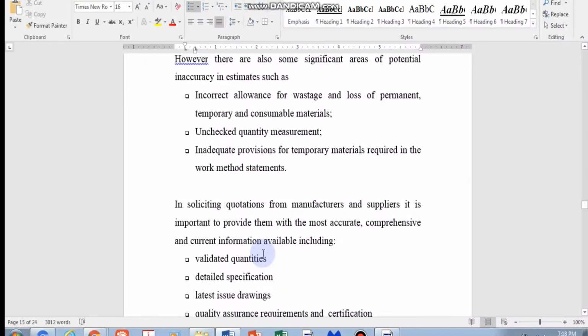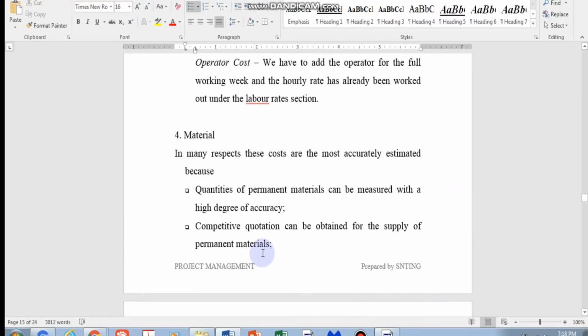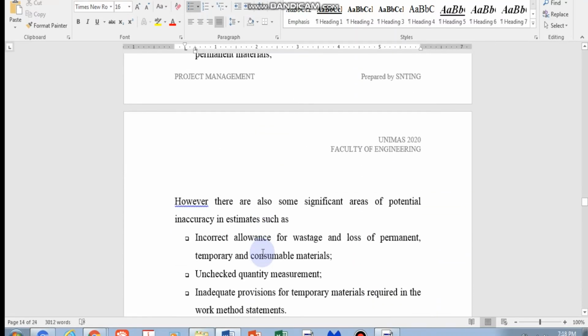Okay, so here these are things dealing with material, and in terms of procurement we need to be very careful. We also need to look at the billing cycle, meaning that if the supplier can give you 30 days, 60 days, 90 days or 120 days of payment, you will manage your cash very differently. So we'll talk about that more in cost management later. This is more on what we call cost management, financial management dealing with cash flow and all that. Yes, it's also part of what an engineer must learn to do as well.